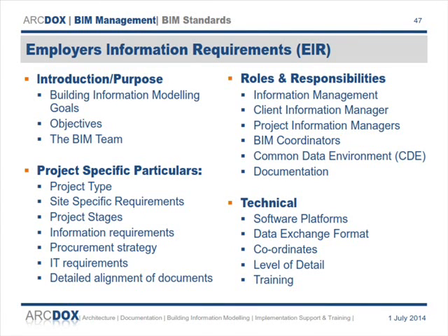Project-specific particulars are just stuff about the project, roles and responsibilities. Then we look at again, but you need to define who's going to perform those roles, who's going to deal with the information management, who's the client point of contact, who's the project team's points of contact, who are the BIM coordinators, who's managing the data environment and the documentation on the project. All need to be included in that EIR.